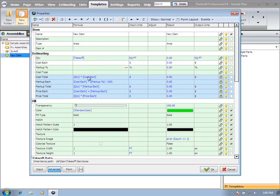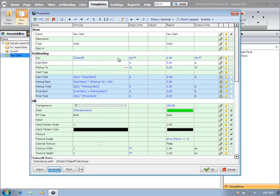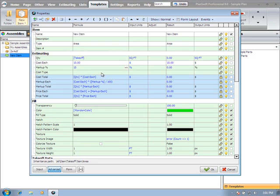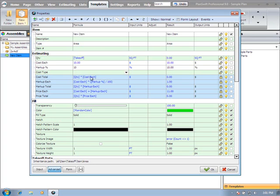The other thing to consider in PlanSwift 9, especially if you're building new parts, new assemblies - really the only fields you have to worry about setting up are going to be your quantitative takeoff, whatever that calculation is going to be you're going to need to quantify, or your material, and set the cost. Cost each and markup percent. So once you have your cost each entered, I'll put ten dollars and put a markup of ten percent, and you'll see that's calculated. Our cost, which is our cost each. The markup each is calculating what that markup price is. Our cost total is quantity times the cost each, so we can get a total for our item, and we can get a sell price.